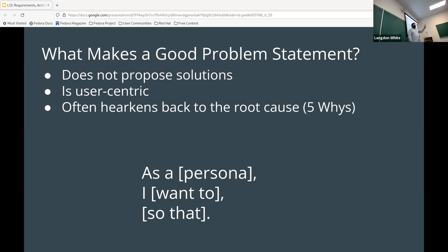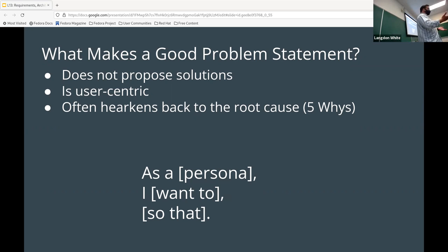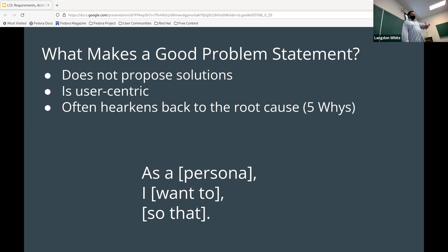The next part of the user story is: what is the user trying to accomplish? 'I want to... what?' You fill that in with what they're actually trying to accomplish. For example, a claims adjuster — the person who says yes or no on insurance claims — as a claims adjuster, I want to be able to sign off on an insurance claim. And why? So that the end customer gets their money, or so that we're in compliance with some law. The reason matters because different reasons would be different requirements.